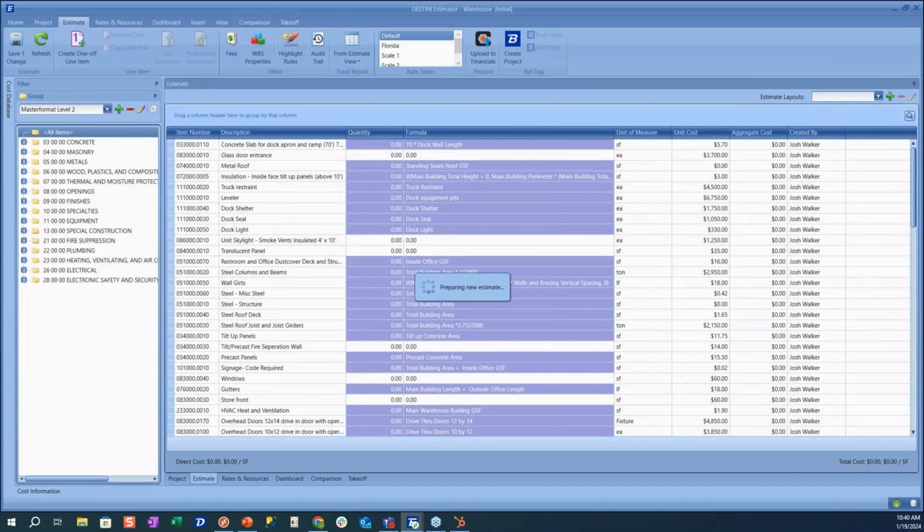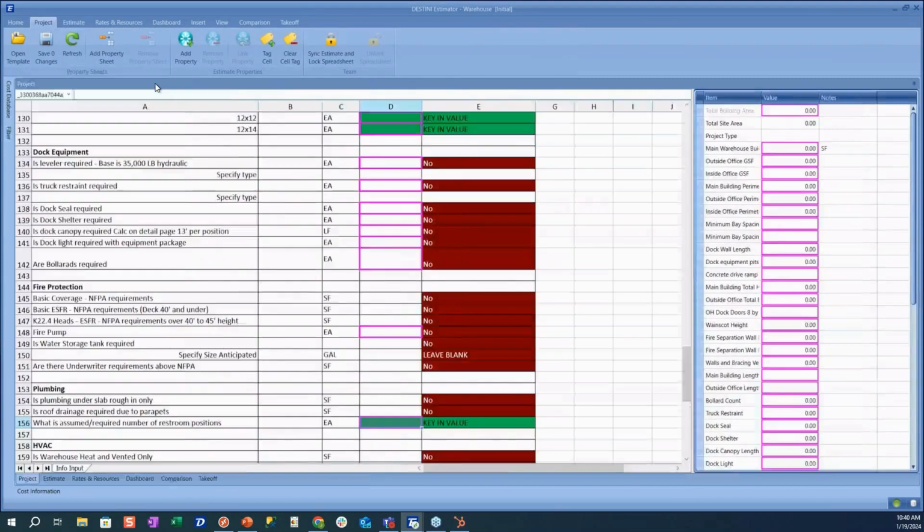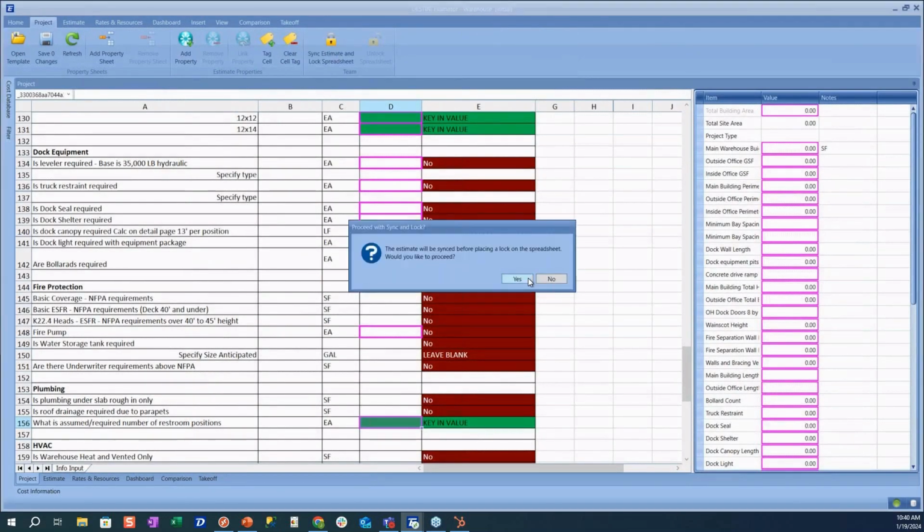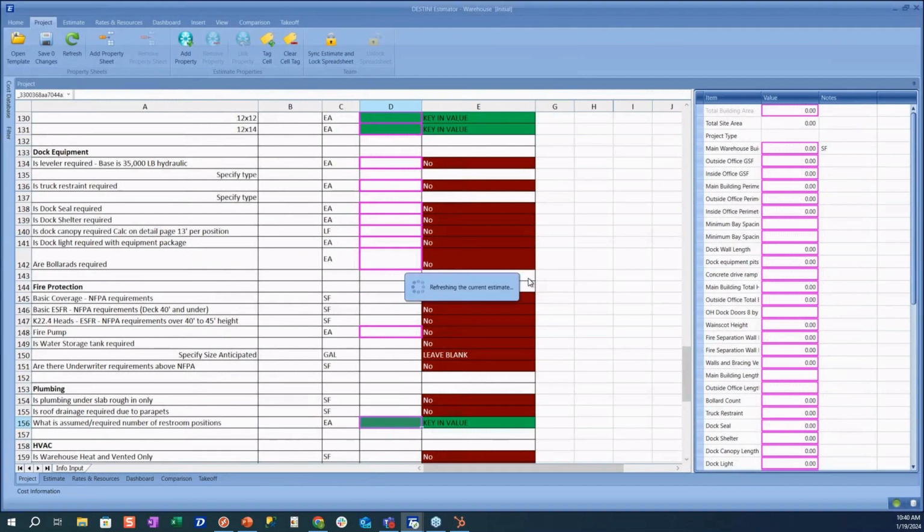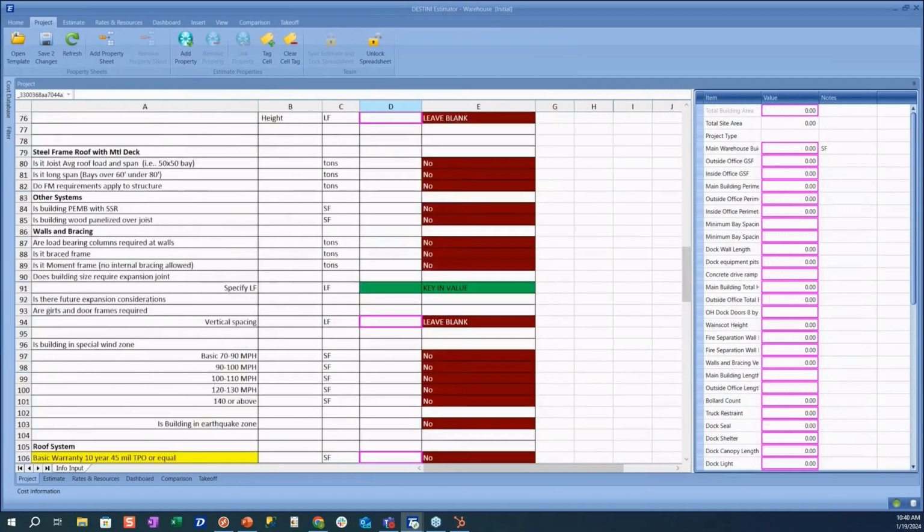So as we begin from this template containing line items, those line items have formulas, total building area, but they'll have a quantity of 0 currently. We have a $0 direct cost for our estimate. In this particular template, we've set this up for a particular market sector. We see our clients use these when they're building probably 3 or 4 or more conceptual estimates within a particular market sector each year. This is an example of a warehouse.